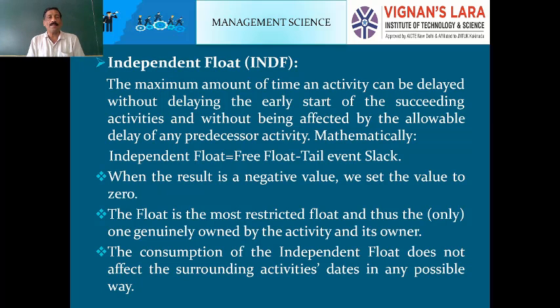That is, the maximum amount of time an activity can be delayed without delaying the early start of the succeeding activities and without being affected by the allowable delay of any preceding activity. Mathematically, independent float equals free float minus tail event slack. I will explain tail event. Further, when the result is a negative value, we set the value to 0.